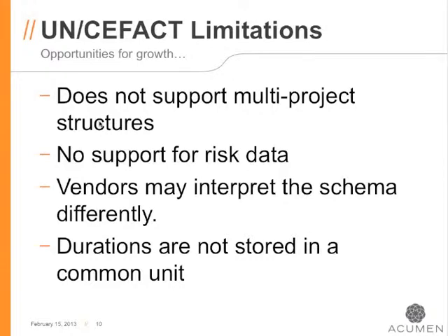With regard to risk data, one of the key elements, and this might surprise some people, it may not surprise others, there's a requirement in that IPMR DID for an SRA, known as a schedule risk analysis. There's no support to maintain that information in the CEFACT format, either the risk inputs or the risk outputs, yet it's a required exercise. So this is an area where I feel that the data schema hasn't quite caught up to the process yet, but I expect to see improvements in this area.